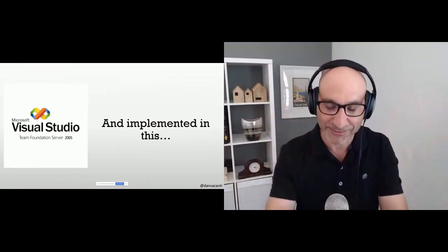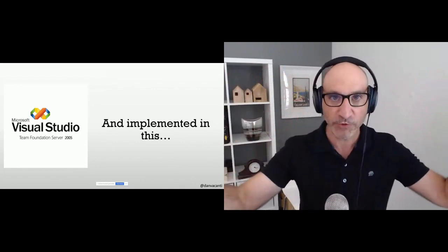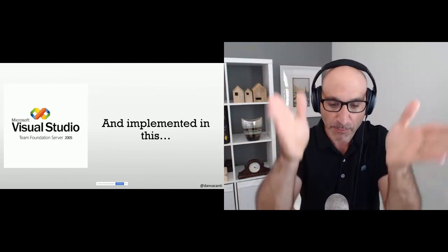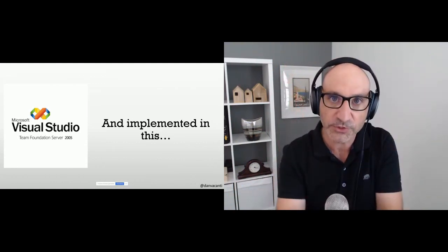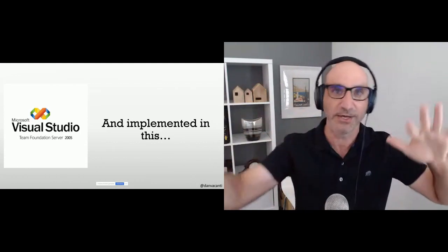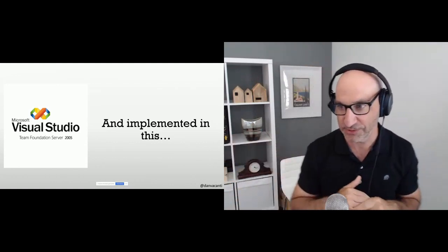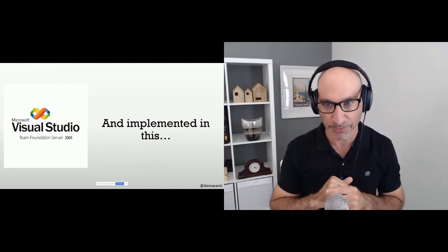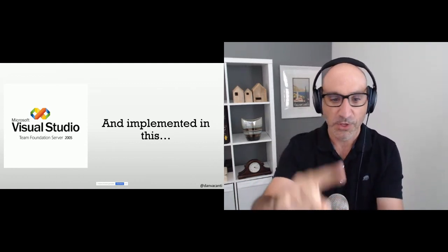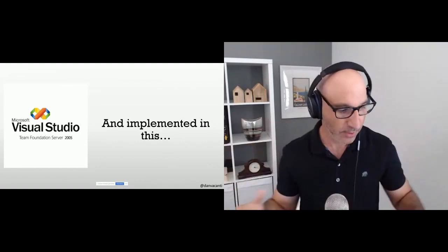So number one, and I have to be very, very clear about this, there was no overall visualization. No one person had an end-to-end view of what was going on. As an engineer, all you saw was your own particular queue. And the idea was supposed to be that by just having blinders on and focusing on your part of the process, the system was supposed to kind of self-level, right? The work was just supposed to manage its own way through the process. And of course, that was certainly the idea. We'll come back to how successful that was, or not, a little bit later. But yeah, no visualization, no explicit setting of work in progress limits, no person had an end-to-end view of what was going on. So this is the idea that they came up with at Corbis.